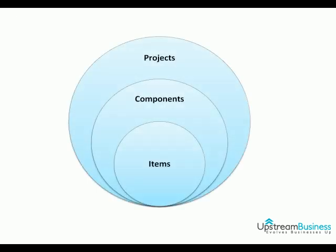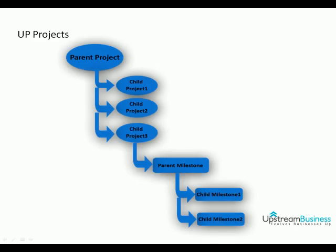Projects, components and items are three major dimensions that are well organised in UpProjects in order to best manage your project portfolio and your business. UpProjects enables you to build nested projects, which means parent projects can have unlimited number of child projects. UpProjects also allows you to decompose each project into components and child components, giving you absolute flexibility in organising and structuring your larger pieces of work across multiple components, resources and even child projects.